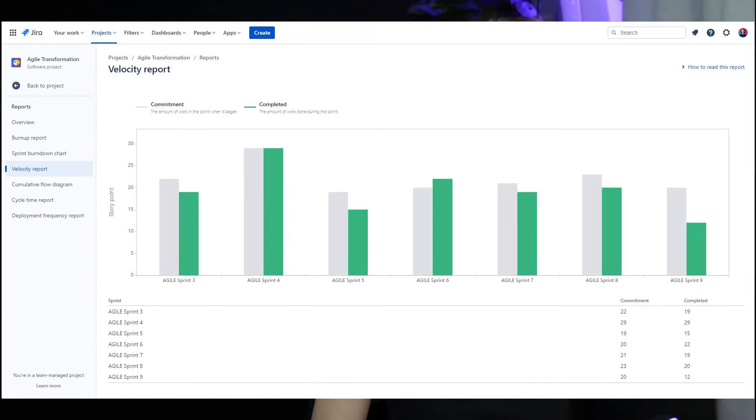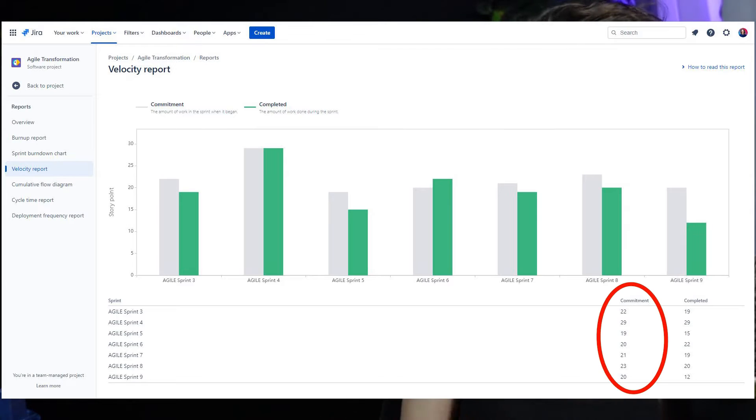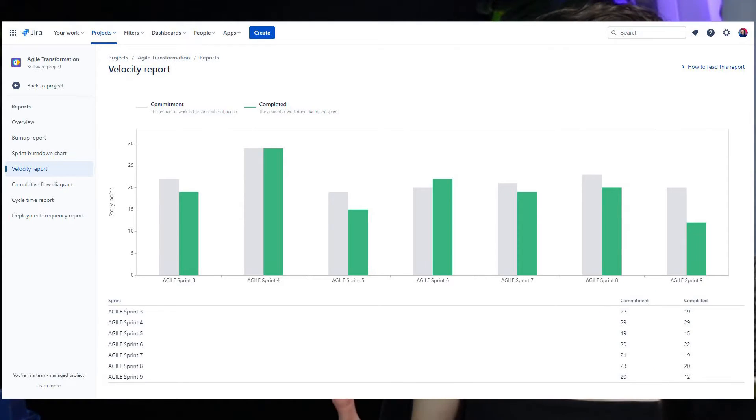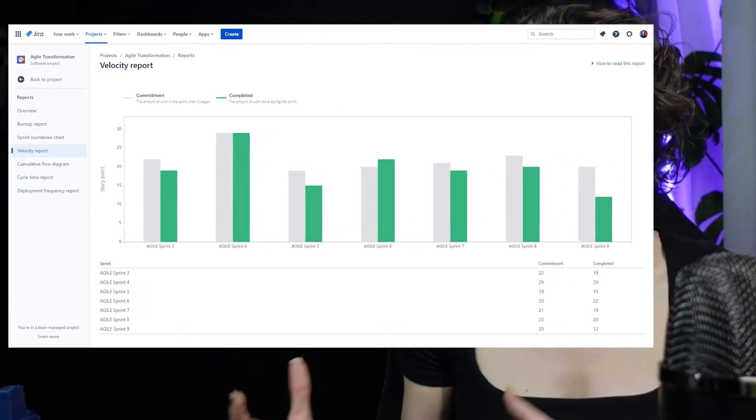Velocity chart. Let's look at how this is presented in Jira in a visual way. Here you can see two numbers tracked: committed story points and completed ones, sprint after sprint. Committed points show how much work the team thought they would complete in a sprint — they committed to delivering that amount. Completed shows the actual work that has been completed, the story points that have been put into done.